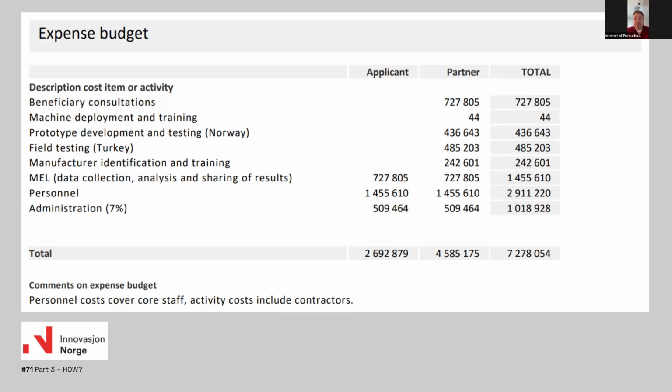And budgeting by categories can really help, rather than having to say how many beneficiaries in what locations. And sometimes you have no way of knowing. So, just doing that as percentages. And you can actually tell here, because of the numbers involved, that this at the top here is 10% of the total. So that's how I put that budget together. And budgeting in categories can be quite nice. Now, the grant was successful, and this was the budget for the next few years, and it was really nice and flexible. It was great. So I quite like that approach.